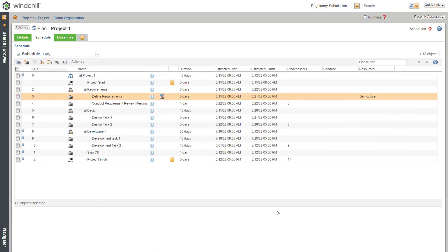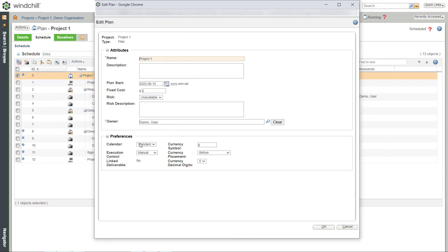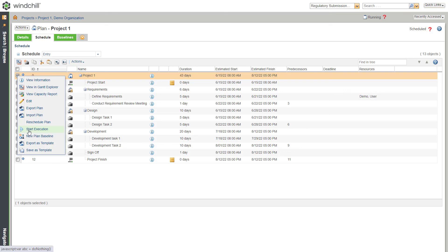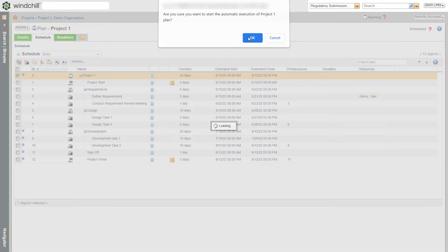To execute the plan, right-click the plan and click Edit. From the Execution Control menu, you can select the Manual or Automatic option. Let's select Automatic and click OK. Now select the plan, right-click and click Start Execution. With this, we are done building a plan.